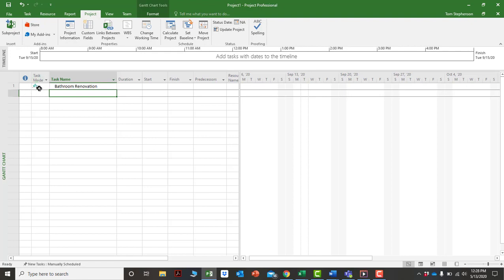And what this tab is referring to, this is what we call manual schedule. So it means this activity is manually scheduled. What I would like for the activity to be is auto scheduled. And I'm going to click on that and you'll see it puts in the date. For most purposes, you'll want your activities to be put into auto schedule.